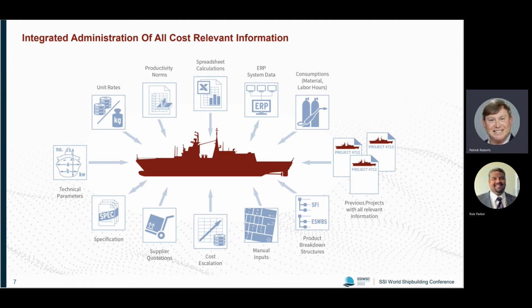The major advantage, or the central idea, of CostFact is that we have a system that accommodates really all information and data relevant for cost estimation. The center is always the current project, and then we have the possibility to import the specification we receive from our prospective client, and to manage the supplier quotations, not only by comparing them in terms of cost, but also in terms of value, in order to use the supply of highest benefit for us.